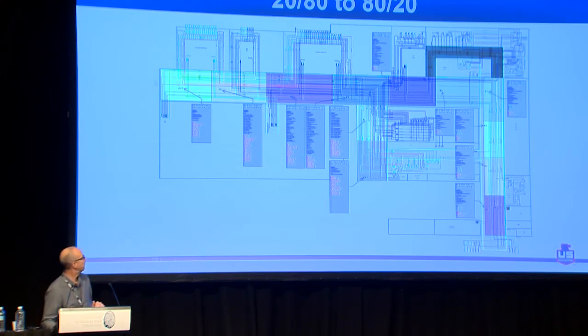So what I put up here is an example of how we start to plan projects. This is a brewery project where our role on the project is to provide steam boiler system, glycol chiller system, compressed air system, and carbon dioxide system for a craft brewery in Charleston, South Carolina. And it's in schematic design, and I can already tell you, we think we can do it in 22 pieces, the whole thing. So the entire job will be delivered in 22 pieces, and we think we're going to be on site for 3 weeks, totally.